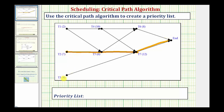Starting at task three, the only way to get to the end would be task three to task seven to the end, which only takes 16 hours. So this is our critical path, and the critical time would be 25 hours. For the next step, we take the first task in this path, which is task two, and it's going to be first in the priority list. Now we remove task two from the digraph and repeat the process.